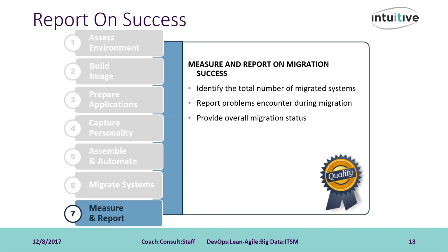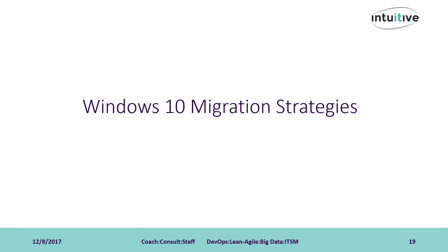Team members will need to track an issue to escalate it if necessary, if it cannot be remediated during the migration itself. Again here, leverage both console reports and the migration plan tracking spreadsheets as a source of metrics to provide to management during the project status calls. These should be updated and reported on weekly, if not daily, during the production deployment phase of the project. Project sponsor confidence needs to be maintained, and the best way to do that is with positive numbers.